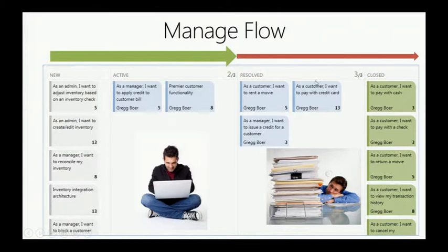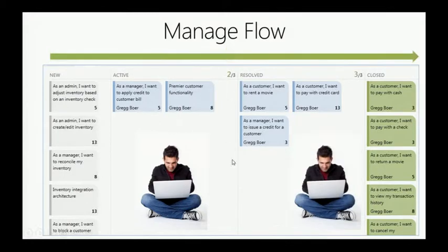If the testers are overloaded, you're going to constrict the workflow as it moves from the left to the right. So what Kanban principles really say is, rather than the developer going and pulling another item off the list and coding on it, what they should do is move over, help the testers finish off their queue, get the flow to a steady rate, so that you have items that can flow at a pretty steady rate from here all the way to the end of the process.